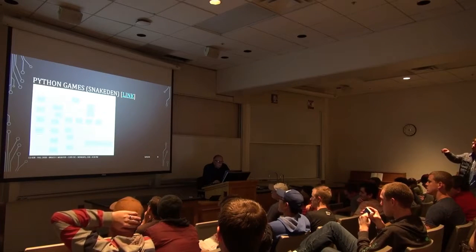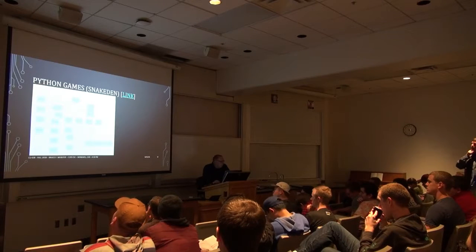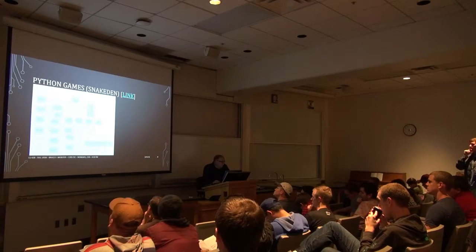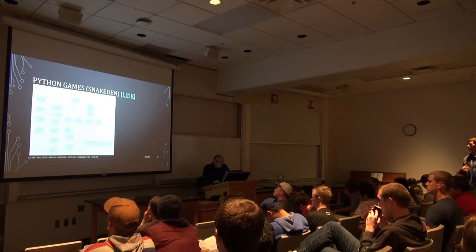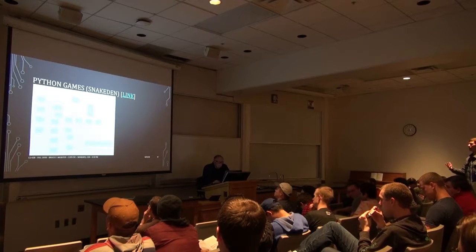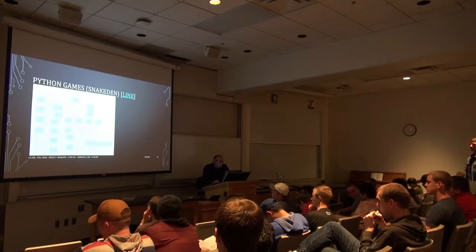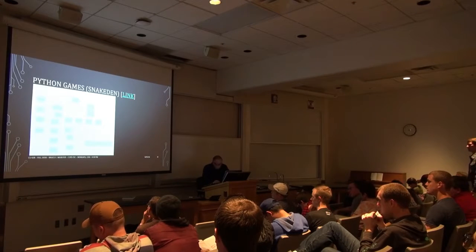Where you'll see some different critical paths. That's some good things. We also had a lot of things that weren't necessary for any of the other things, but came in all at the end, like adding to the player. That all feeds into the final deadline. Those are also things we can throw out if we don't have enough time. Good approach.